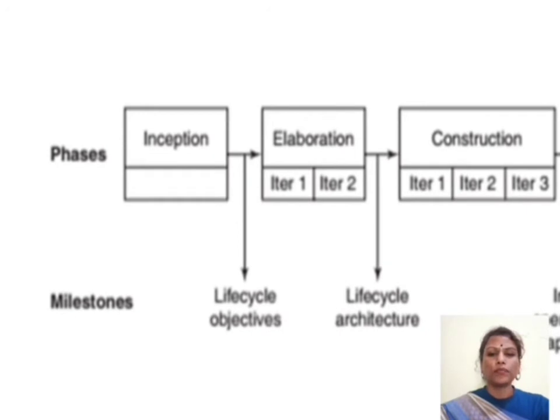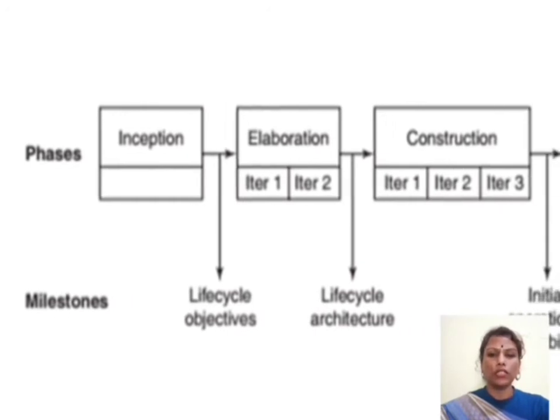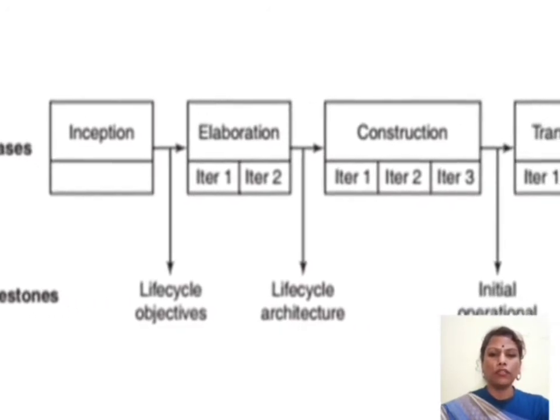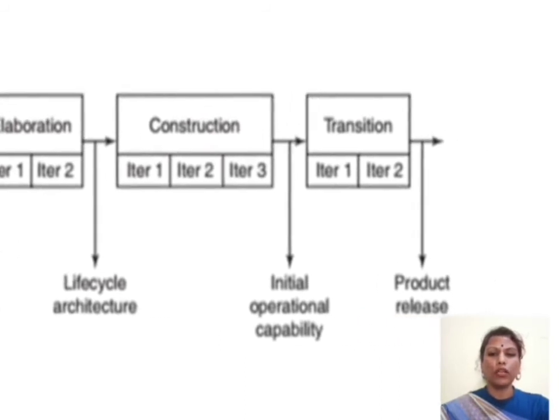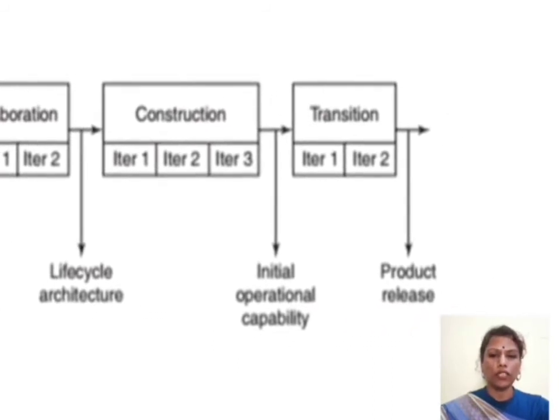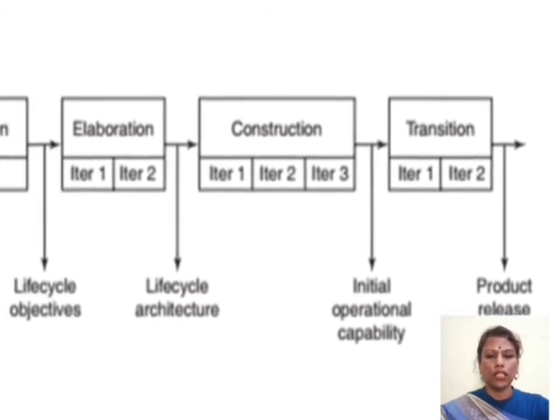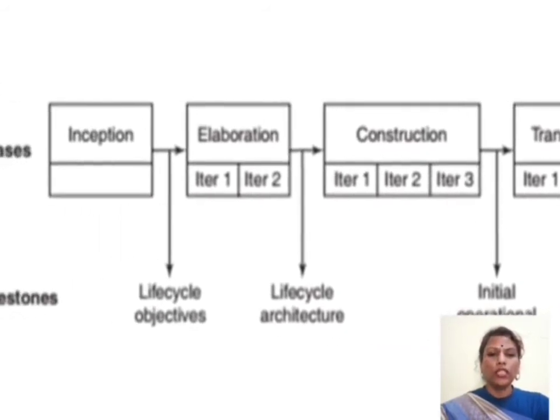See, here each phase has some objectives or milestones which have to be met after the completion of the phase. After the completion of the inception phase only, the elaboration phase is going to be executed. After the completion of the elaboration phase, the construction phase is going to be executed. After the execution of the construction phase, the transition phase is executed.